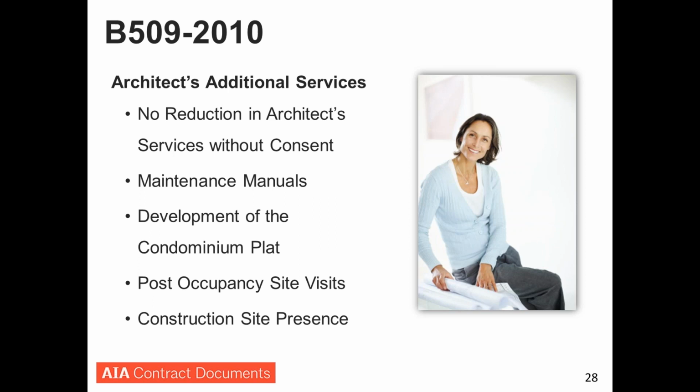I'm sorry, before you move on. Just another way that you need to frame your thinking about condos and why the risk is so great, and certainly you would want to talk with your insurance advisor as well when you're trying to get into these types of projects. The potential for damages is so huge because you have multiple units and multiple unit owners, so that's damages multiplied. It's not like when you have an agreement with a single homeowner in a project.